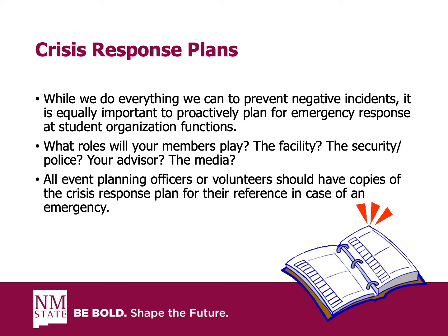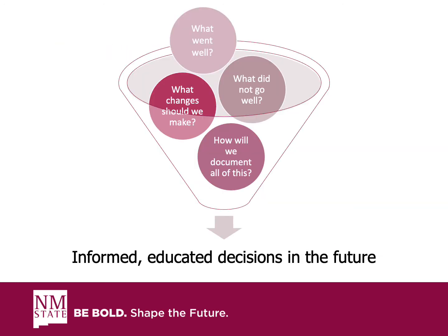When creating a crisis response plan, the following should be included: detailed plans of action for various situations, attention to medical needs, contact information for important parties, crisis fact sheets or incident report forms, designated organizational officers and crisis team who can take charge of a crisis situation. Once created, all officers and volunteers should have copies for this reference just in case of emergency.